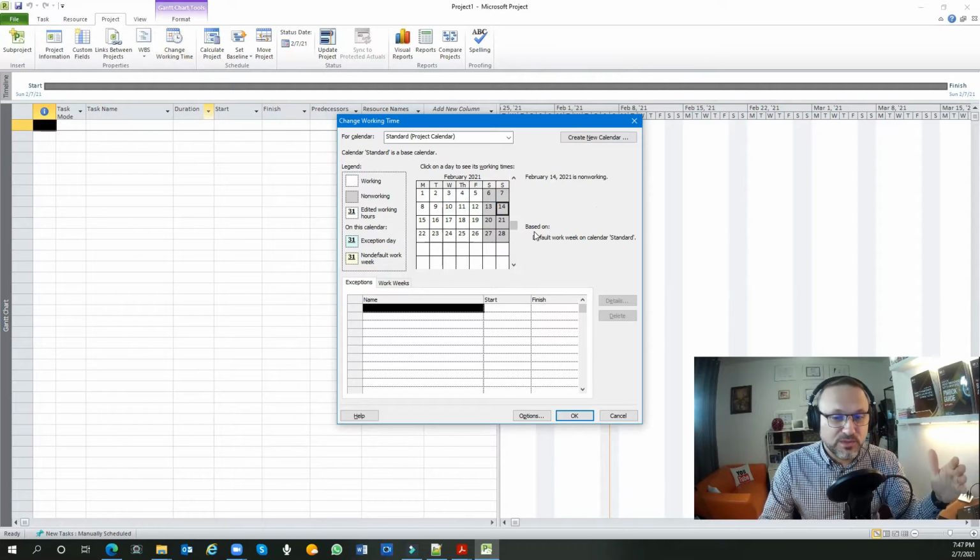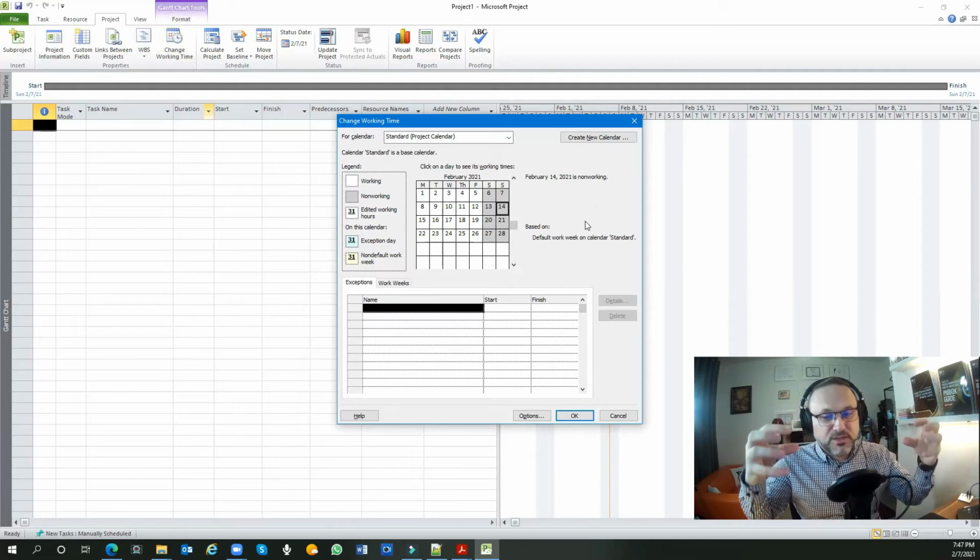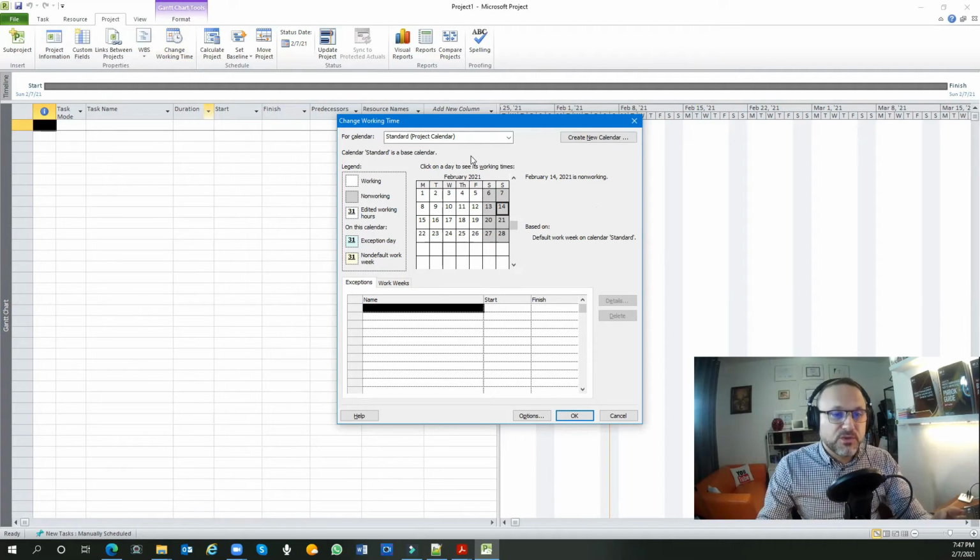So you will define your calendar, you will add your duration of the project, start and finish point. Then during this period, you add your holidays, you add your working days and your non-working days, special non-working days. So you define it, you name it, you can copy the calendar once you create your calendar.